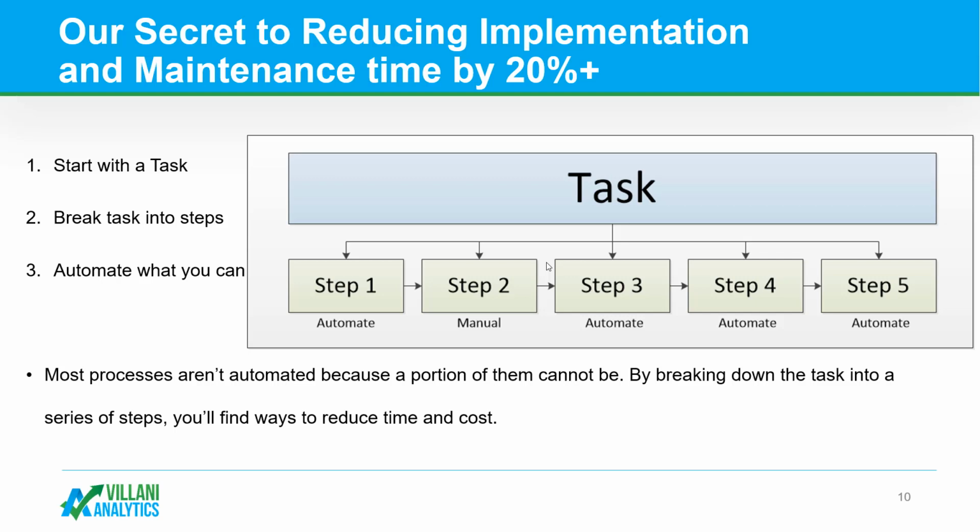Just recently, I was on a project where the entire team had to work a weekend because the project was falling a little bit behind. And we went through the steps. The team lead said, hey, we were looking at ways to automate this. It can't be automated, so we need the entire team to spend this whole day and go through these 8 steps. I looked at the steps. I saw, well, it can't be automated because there are some pieces that just need human judgment. But 6 of the 8 tasks can be automated, so why don't we just do that piece?